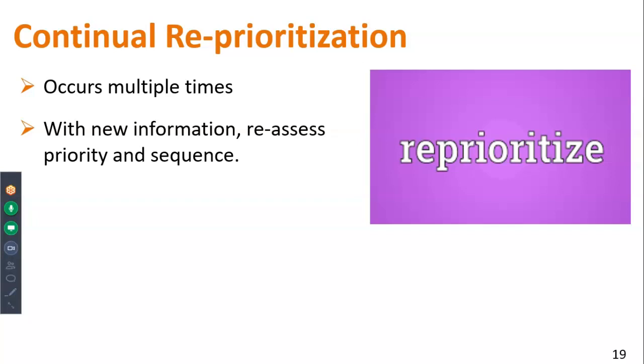One of the keys in this would be to be very clear about ensuring that people understand when decisions have been made and what those decisions are. I'm going to say the bad word in the agile environment: document those decisions. Document things so that if somebody raises another question, you can say, this is the decision we made, this is why we made that decision.